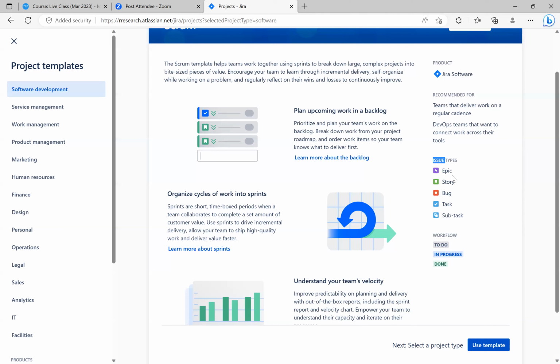Say it's a particular feature or a group of features. We want a new e-payment platform, right? So we're developing a system that will have different components, but one of them is online payment. So we can group all the features that will go into the online payment part under an epic. So the epic may be called online payment, right? And there we would put all features, all our stories concerning online payments, as part of that epic.